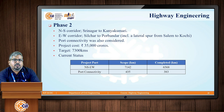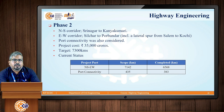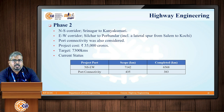The current status of Phase 2 shows that for the North-South to East-West corridor, the scope was around 7,142 kilometers, out of which 6,568 kilometers have already been completed. For port connectivity, the scope was set at 435 kilometers, out of which 383 kilometers have already been completed.